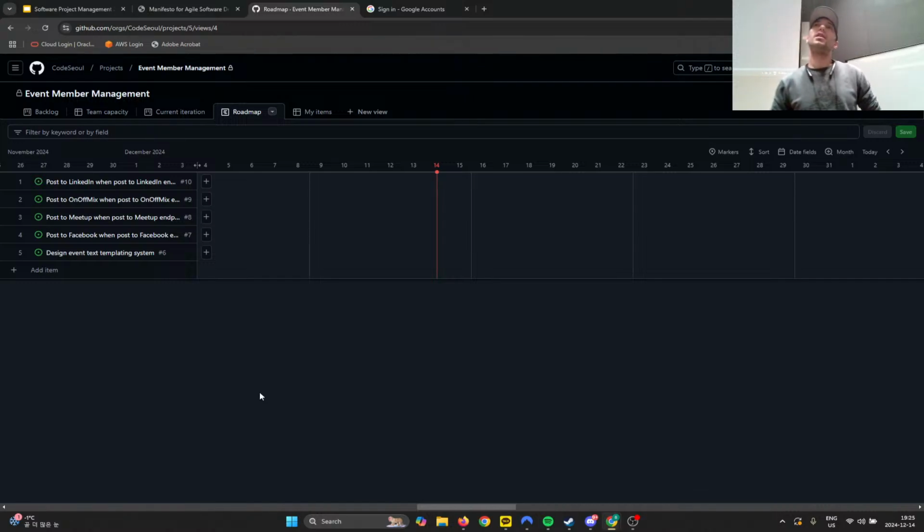Right. So in Scrum parlance, we have this idea of an epic, which is often a feature, but it could also be a milestone, customized to fit your needs. And it's usually something that cannot be done as a single task, right? So again, it could be a big feature, it could be a milestone, whatever. And usually you can put your milestones on a roadmap view. And this is common in most types of software. And then you can basically tag issues to that epic and you're good. So it's a similar idea across all the different kinds of software project management tools. They just call it by different names, which is actually a bit frustrating. But yeah.